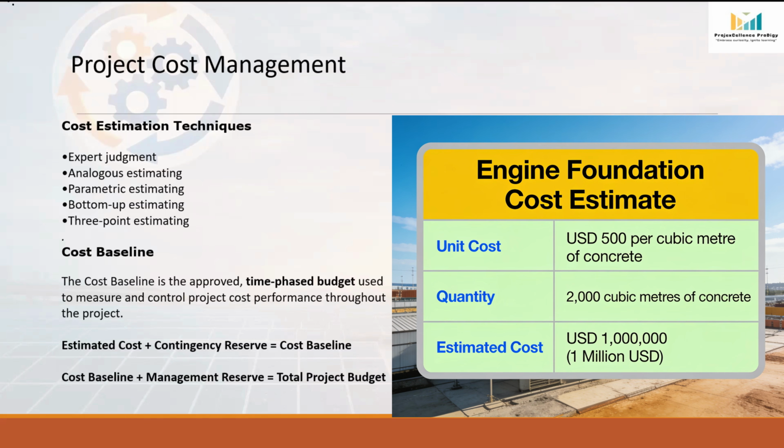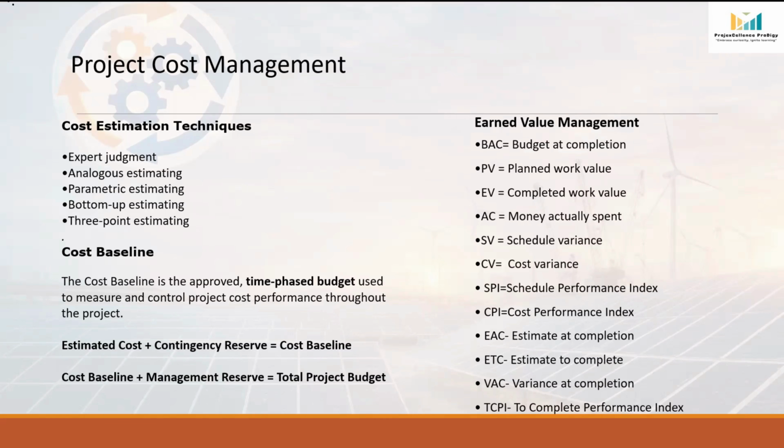The fourth technique is bottom-up estimating. This is one of the most detailed and accurate estimating techniques. Here, instead of estimating the entire project as one item, we estimate the cost of each individual activity or work package separately.